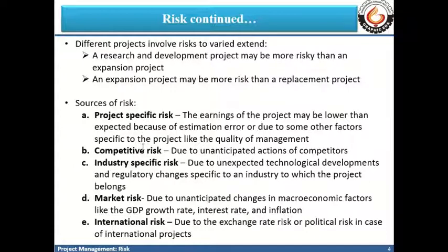If we take an example of a research and development project, then it is considered to be more risky compared to an expansion project. And this expansion project is considered to be in general more risky than a replacement project. So if you have a manufacturing setup, a plant, and you are going for an expansion plan for that project, then that is considered to be more risky in comparison to going for replacement of some machinery in your manufacturing setup.